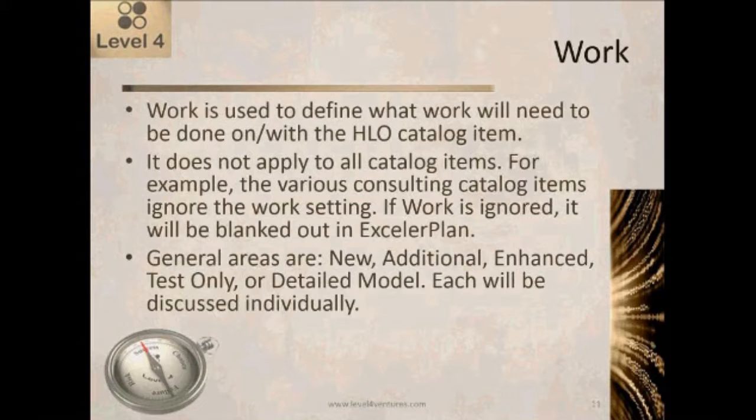Work is used to define what work will need to be done on or with the HLO catalog item. Work does not apply to all catalog items. So for example, the various consulting catalog items ignore the work setting. You can still select a work for those items, but it will be blanked out and it will not be used as part of the calculation.